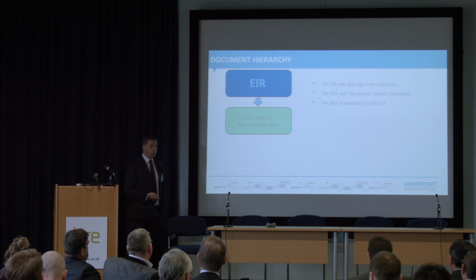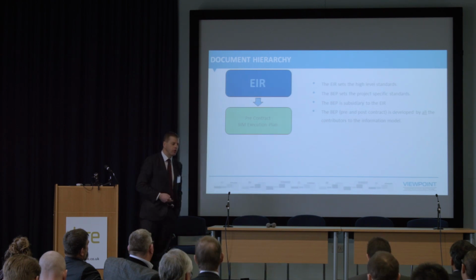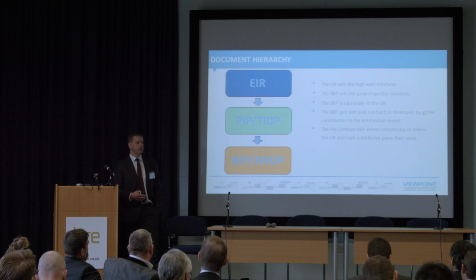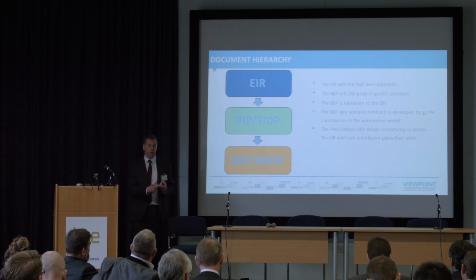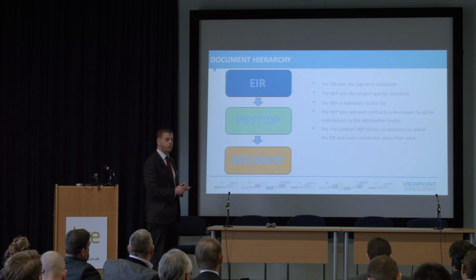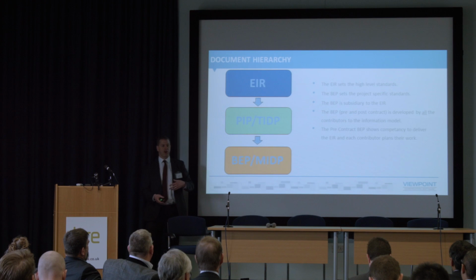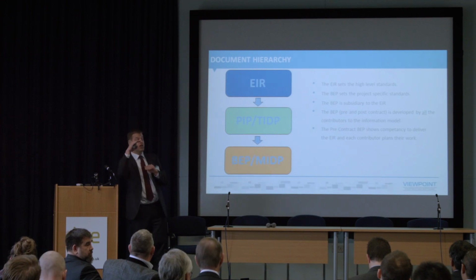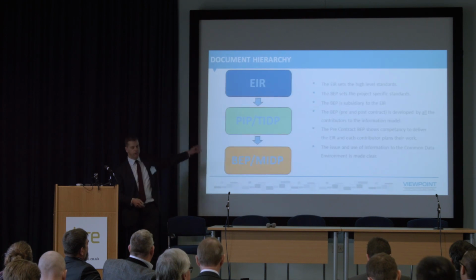Second, the high level says that the design and construction teams respond, first of all, with a pre-contract BIM execution plan, which includes evidence of your capacity to deliver what's being asked for. And then post-award, each company will say who they're employing on a job and what they're expecting those employees to do at each work stage. And then you have a post-contract BIM execution plan and a master information delivery plan, which sets out what each company will be delivering and when. So it's the coordinated version of each of those task information delivery plans.